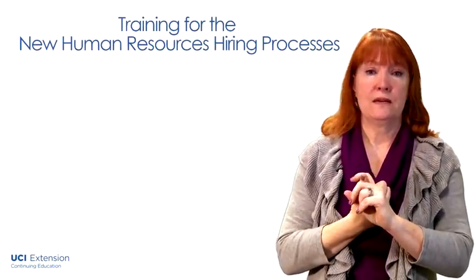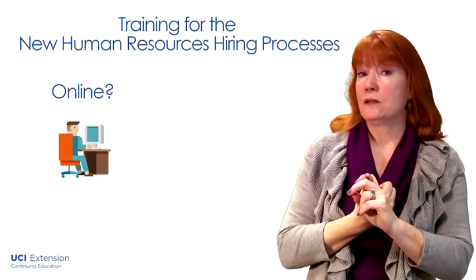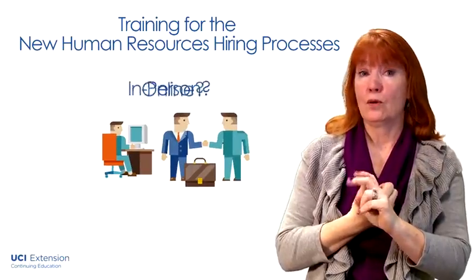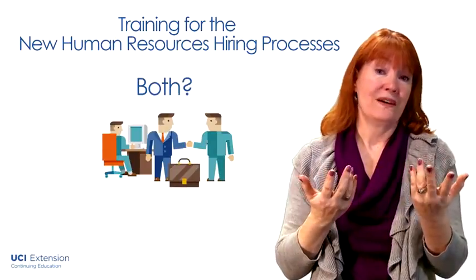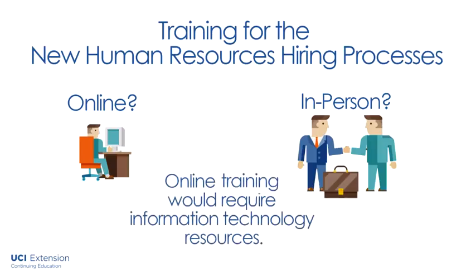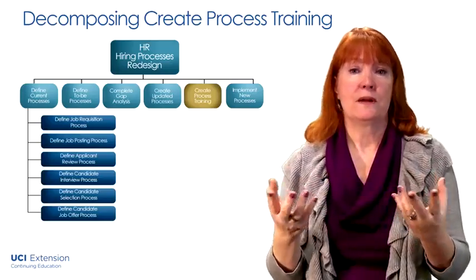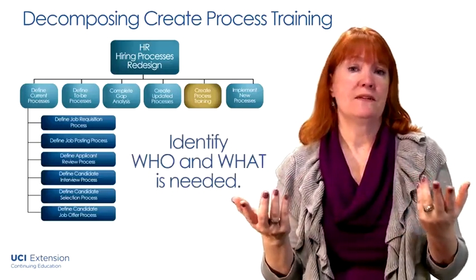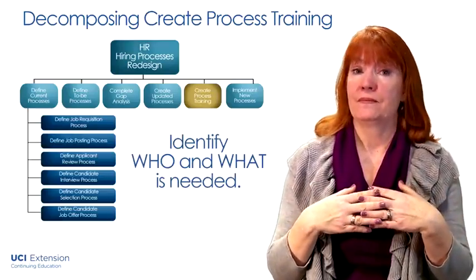Consider the training for the new human resources hiring processes. Is this going to be online training or in-person training, or both? The resources required for each approach will vary. For online training, it's very likely that some information technology resources might be needed. For in-person training, this is less likely to be true. Decomposing the create process training is going to help identify who and what is needed to really create the training.